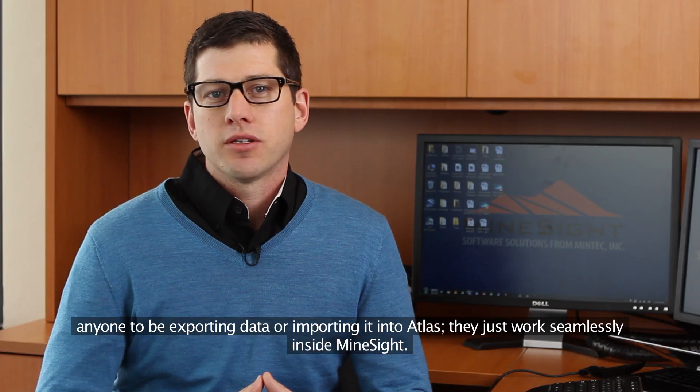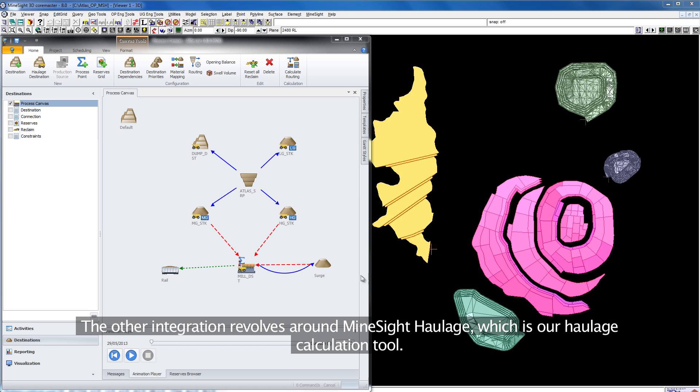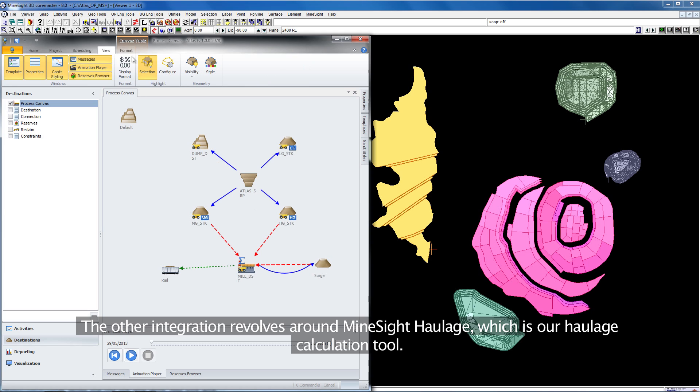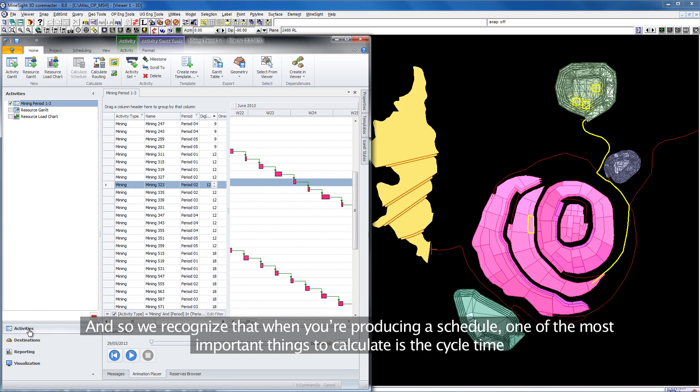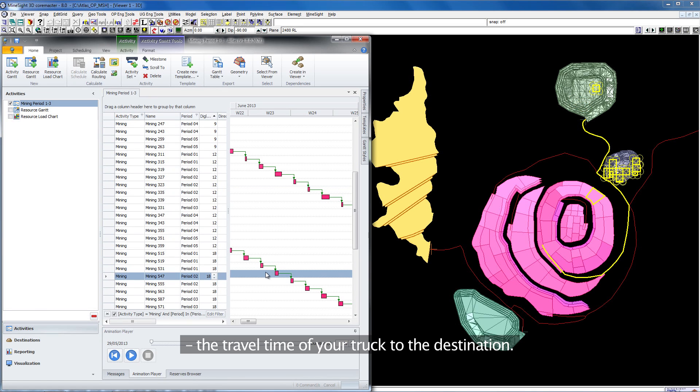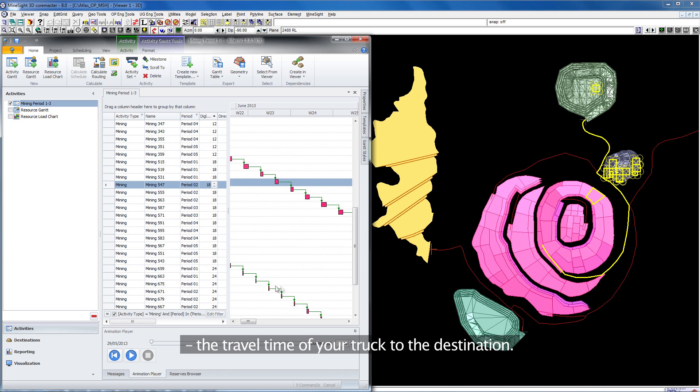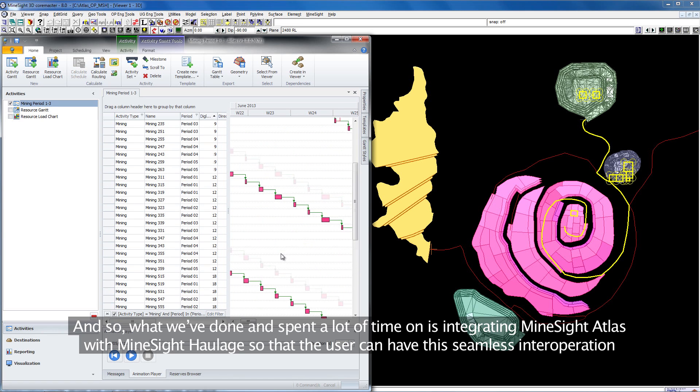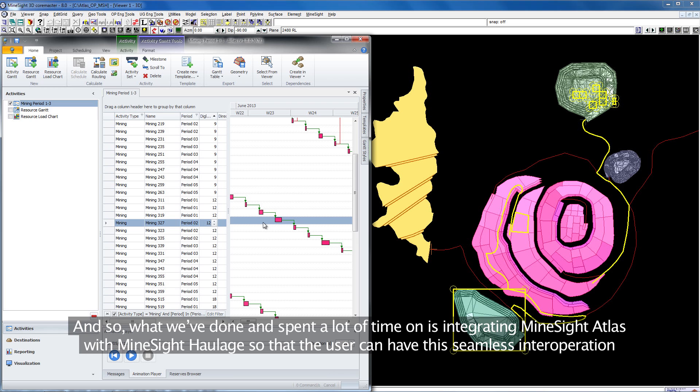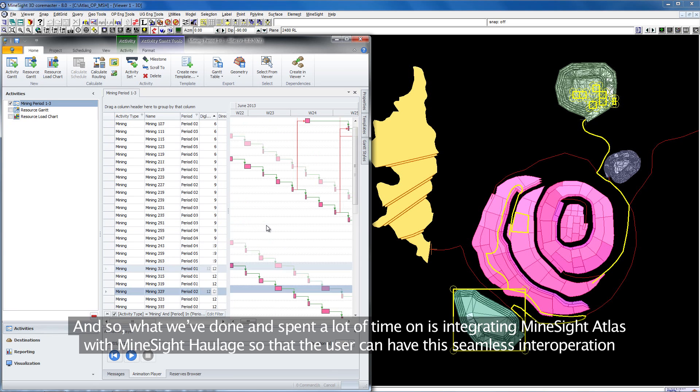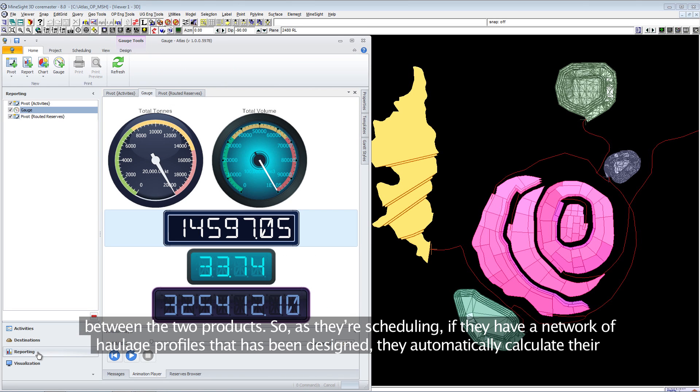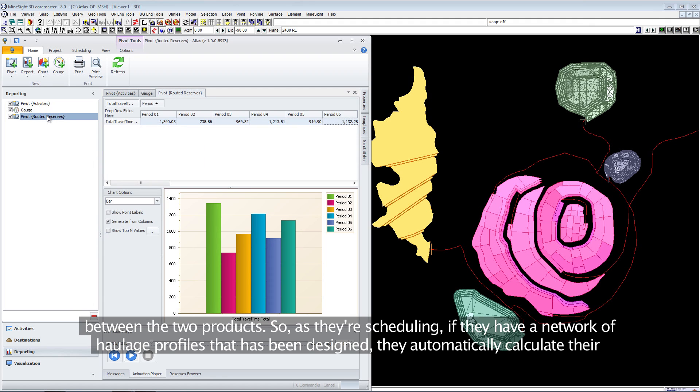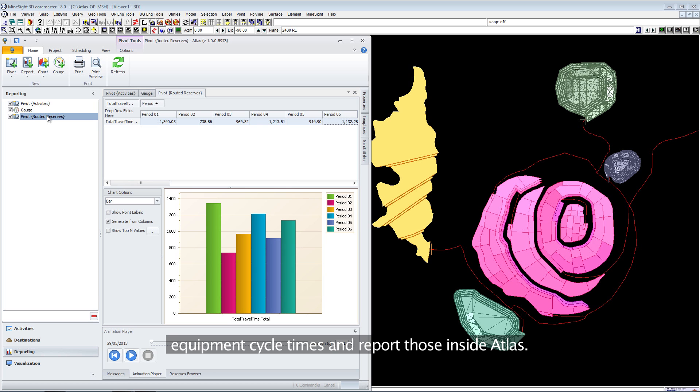The other integration revolves around Minesite Haulage, which is our haulage calculation tool. We've recognized that when you're producing a schedule, one of the most important things to calculate is the cycle time, the travel time of your truck to the destination. What we've spent a lot of time on is integrating Minesite Atlas with Minesite Haulage so that the user can have seamless interoperation between the two products. As they're scheduling, if they have a network of haulage profiles that has been designed, they can automatically calculate their equipment cycle times and report those inside Atlas.